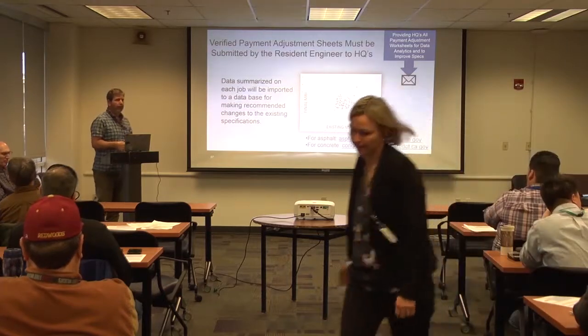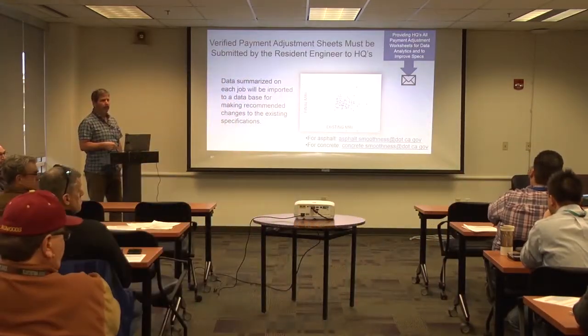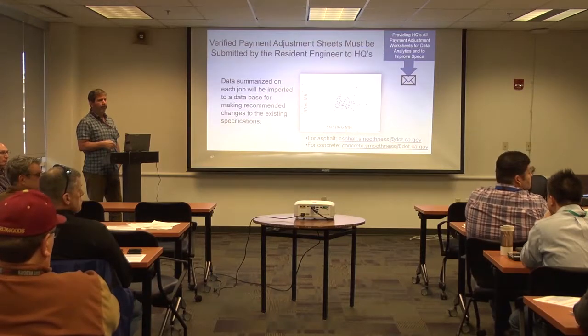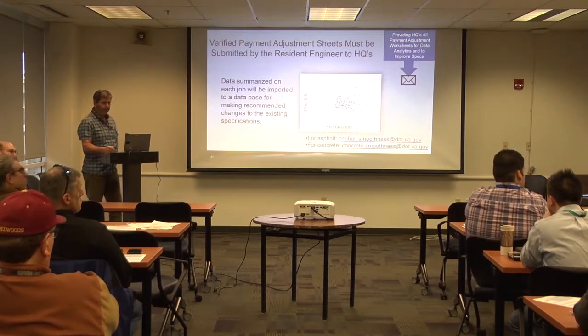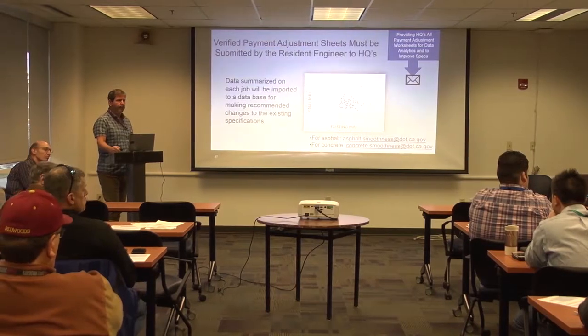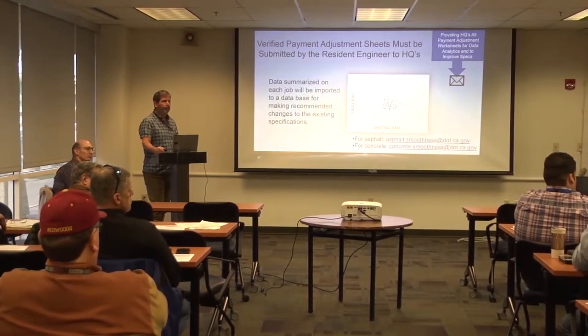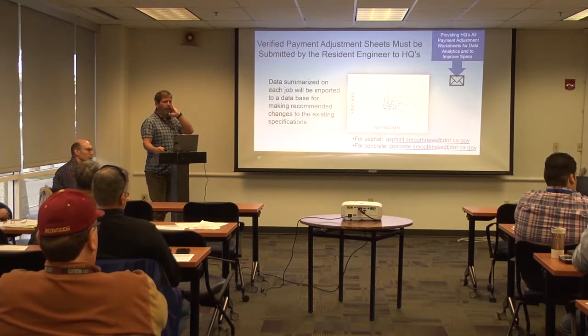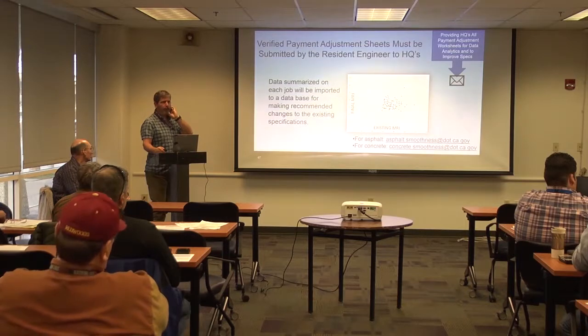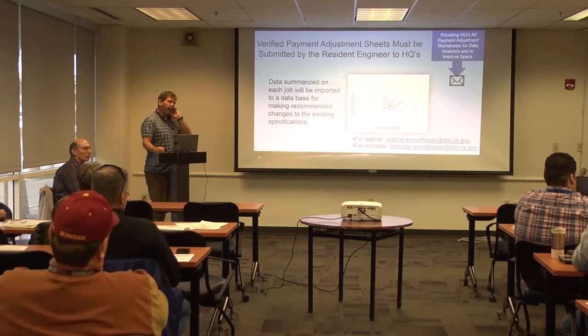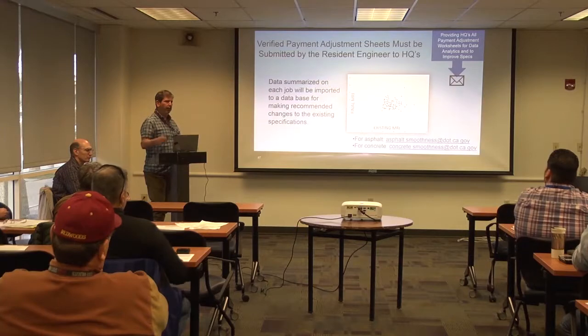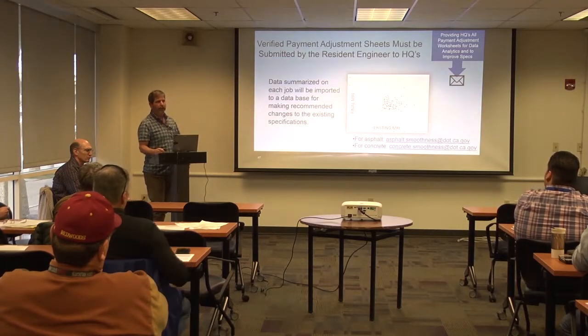You mentioned the bidding package will include existing MRI. So the contractor will run their existing, and if it varies more than 10%, which one do you use to compare for incentive? We're always going to use the contractor's existing profile, always. The one from pre-bid is just to check if there's a differing site condition or something changed. We're not saying that if it's 10% different we're going to make any adjustment. We're just saying let us know, so we'll look at it.